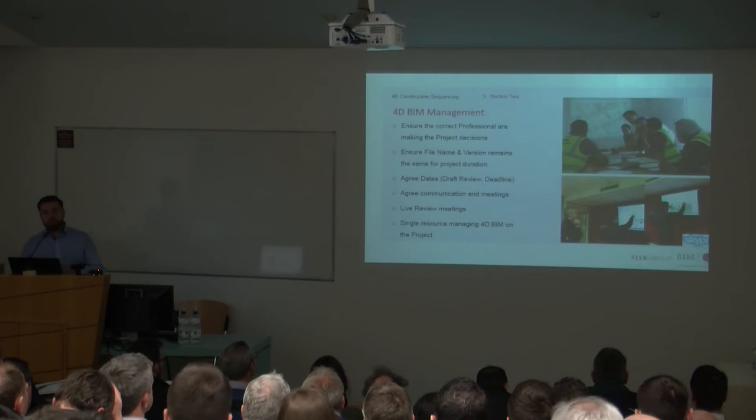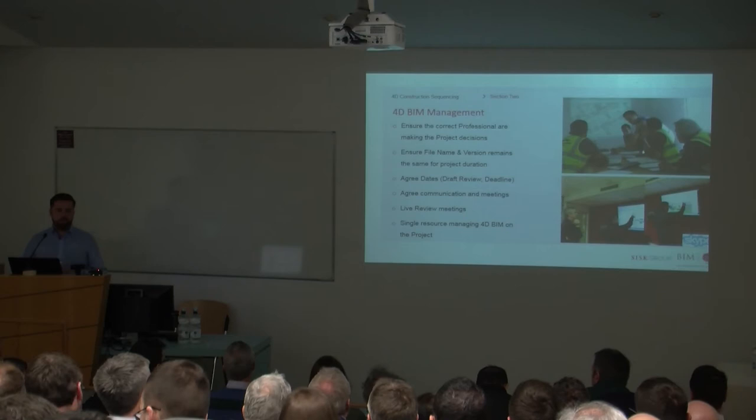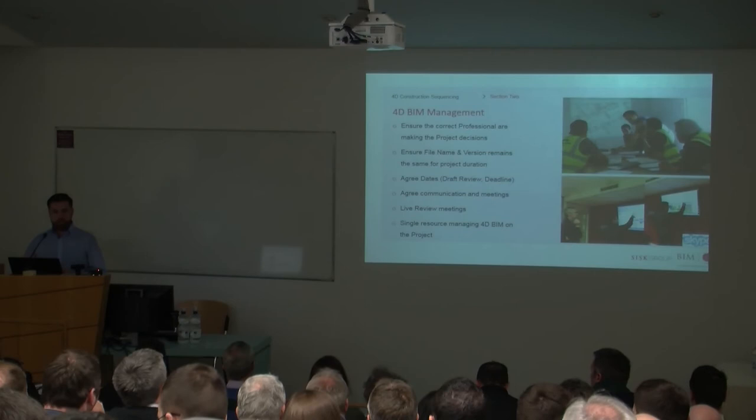So, agree communication and meetings. If it was a 6 week turnaround, you'd have a review meeting after the first 2 weeks, review where your model is, whether you have your site set up, compound and logistics all developed at this stage, and whether your construction program and construction methodology are nearly finished. If you set these meetings so that they're productive, you come out of the meeting knowing that in 2 or 3 days' time you have to have a review of the construction sequence.